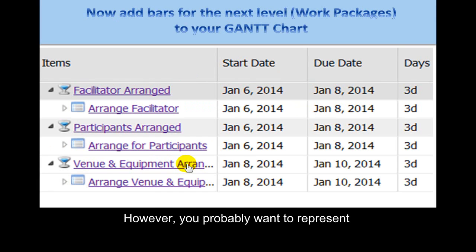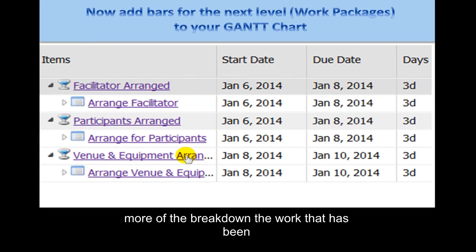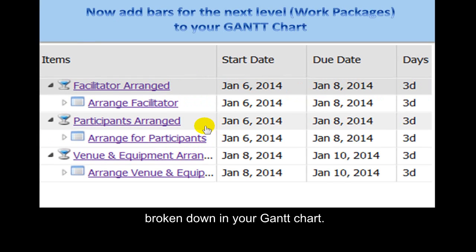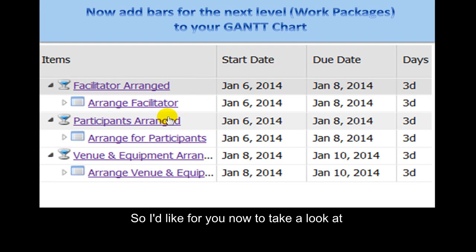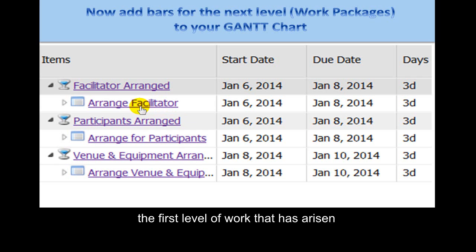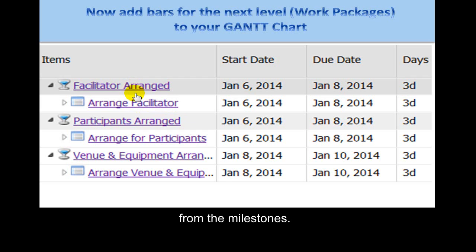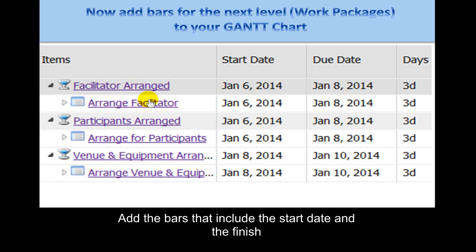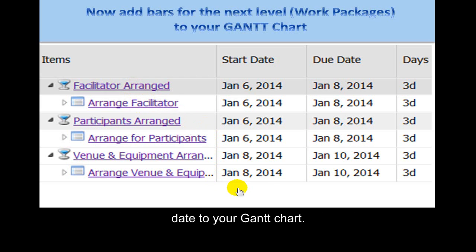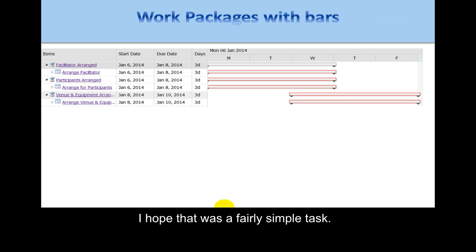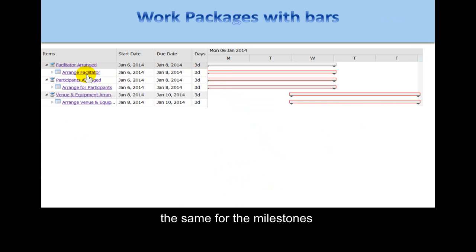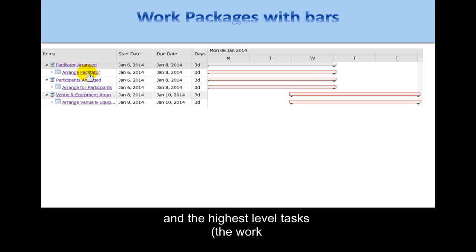However, you probably want to represent more of the work that has been broken down in your Gantt Chart. So I'd like you to take a look at the first level of work that has arisen from the milestones, and add the bars that include the start date and finish date to your Gantt Chart. It turns out that the bars are exactly the same for the milestones and the highest level work packages.